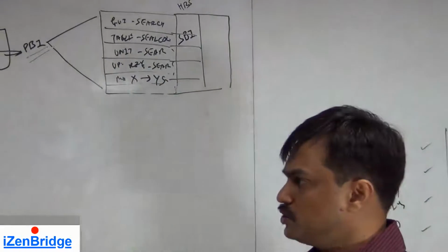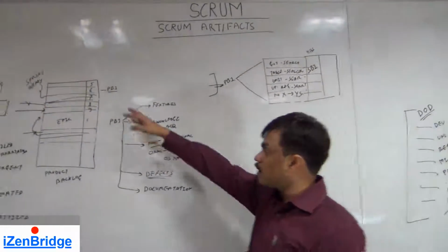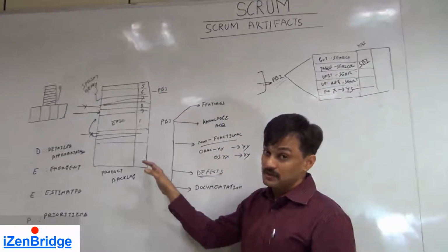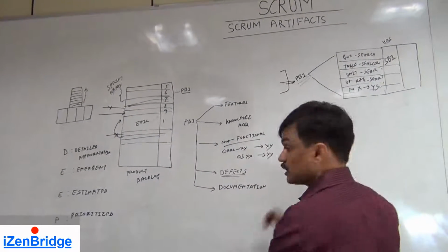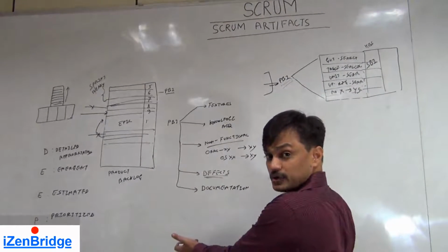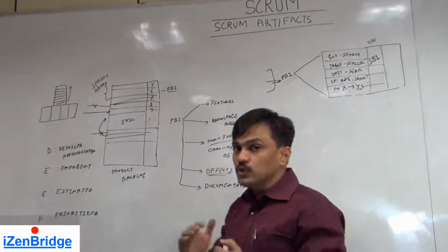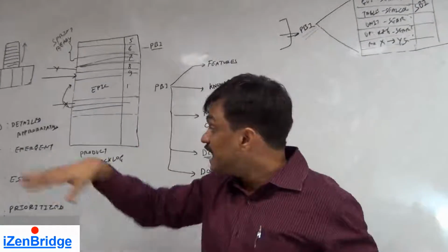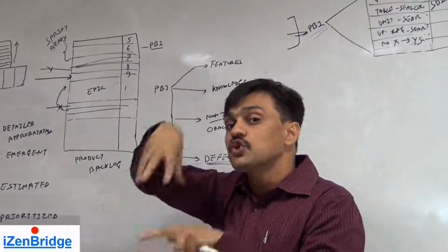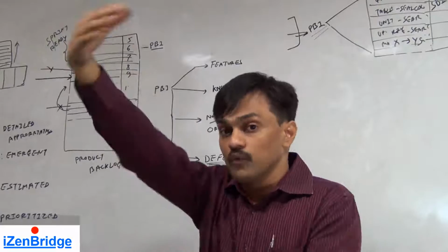Now you may wonder, when I was talking about the product backlog, I said that a product backlog item also has an estimated number. And here again I am saying the sprint backlog should have estimated hours. So if it is done there, why do I have to do it again? In Scrum, we do two levels of estimation. That was a top level estimation, which is good enough to give us a release plan, to give us a future direction for our work.